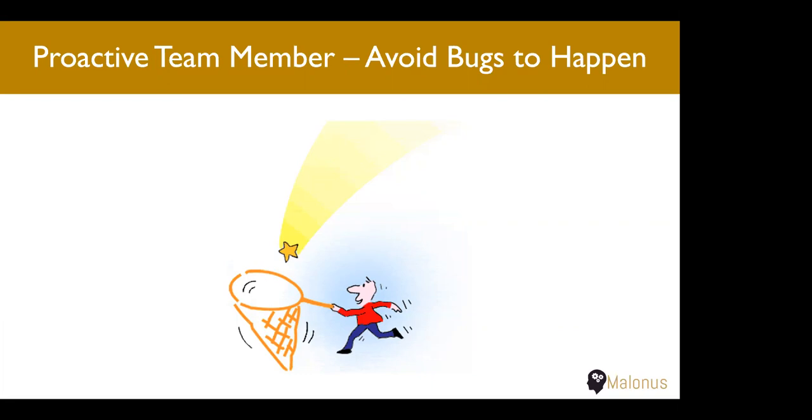Instead of that, before you write a single line of code of a user story, the developers and testers should sit together and discuss all the test scenarios for that story. You may not immediately find all the test scenarios, but you may have enough test scenarios for a developer to start with